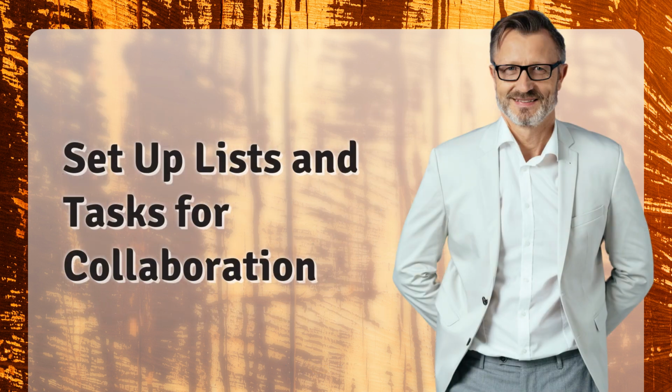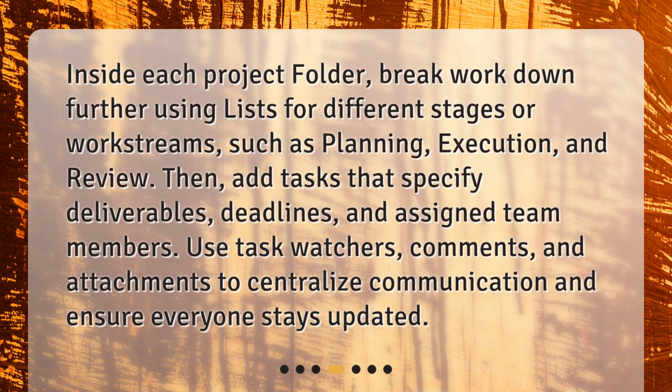Set up lists and tasks for collaboration. Inside each project folder, break work down further using lists for different stages or work streams, such as planning, execution, and review. Then add tasks that specify deliverables, deadlines, and assigned team members. Use task watchers, comments, and attachments to centralize communication and ensure everyone stays updated.